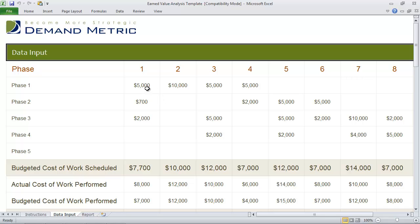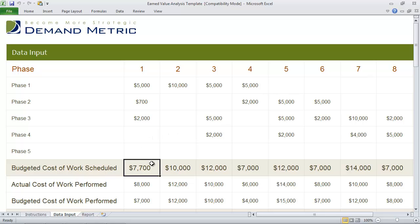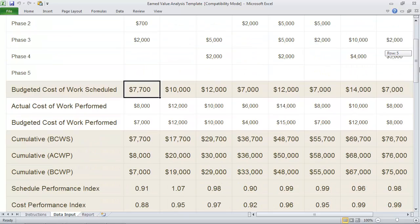Then you identify the costs for each phase at the different periods of time. The budgeted cost of work scheduled will automatically be calculated based on the numbers that you enter here.